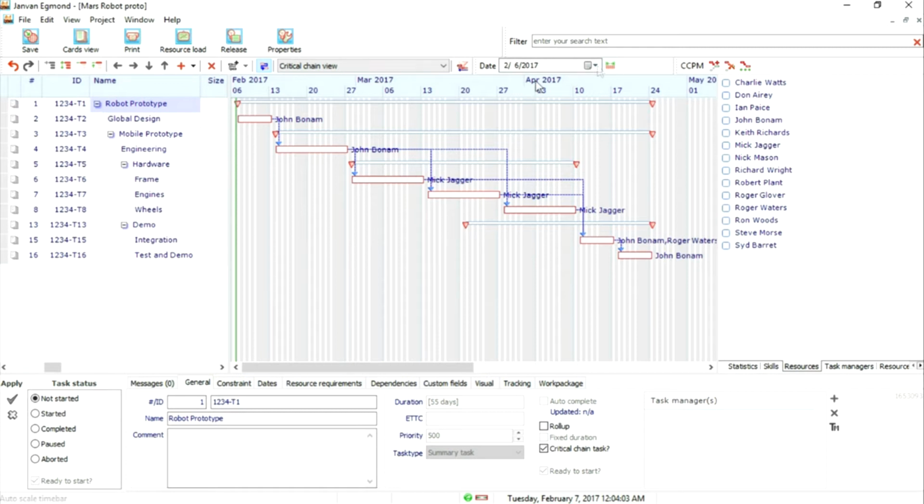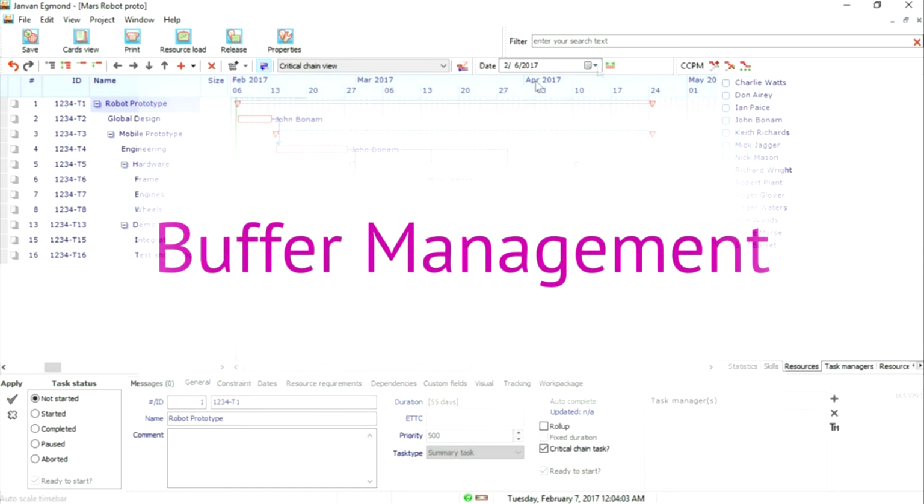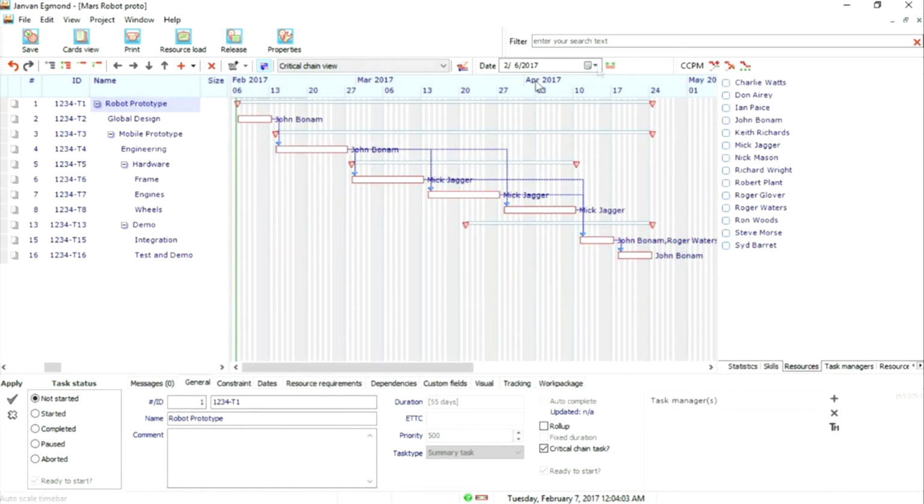The second tool of critical chain project management I'd like to introduce you is the buffer management. Normally, all tasks in project contain some sort of safety to absorb uncertainties or fluctuations or surprises. This happens automatically and people do it without thinking. It is to avoid that you have to break your promise if something unexpected happens. Well, to avoid delays completely, you should add huge safety margins. And of course that is not possible.